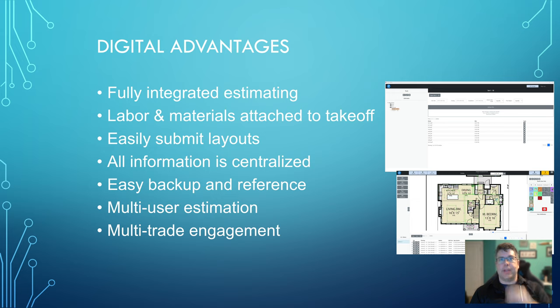Multi-user estimating. Now, this is again when you get into those team projects, absolutely essential to have everybody working from the same set of data. And that can be a massive issue if you've got a couple of estimators dedicated to a project, but they're working on different sets of drawings. Different addenda come out, one person cuts them into the drawings, the other has them sitting off to the side. Stuff gets missed when that happens. In multi-user estimating, everyone works from the same set of drawings.